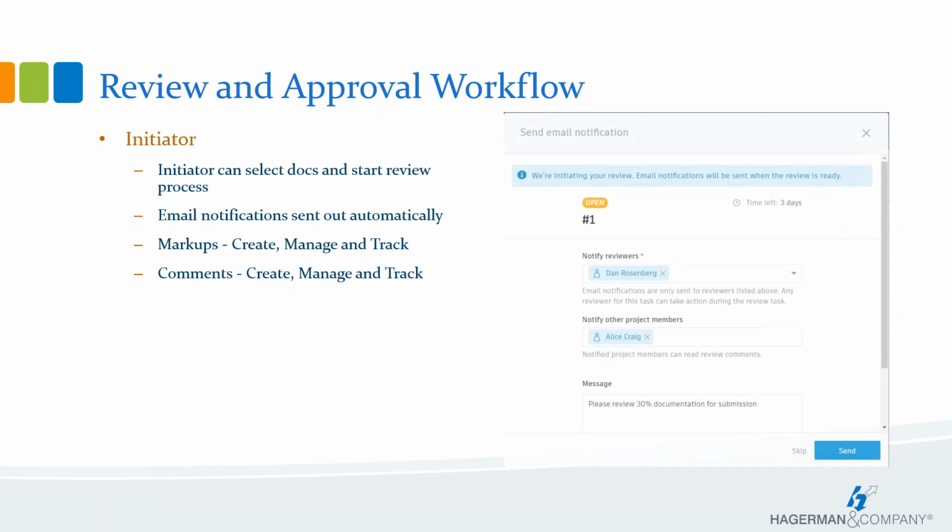Once the Submit button is selected, you'll be prompted to identify who will be the reviewer or reviewers and who is going to be the approver for this review. Select a reviewer from the list. A predetermined list of team members, roles, or companies will be available to choose from depending on how the project admin set up the project review template that was selected.